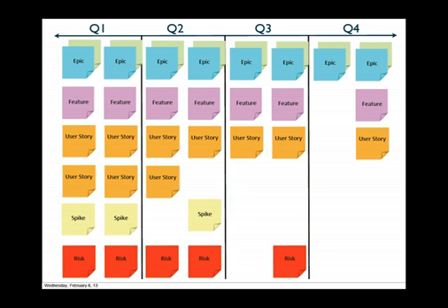So as we're decomposing the features and the user stories and coming up with spikes and reducing risk, we absolutely have to have a collaboration between the architects and the business at the higher levels, because at that point, we're no longer trying to figure out how big it is. We know how big it needs to be to be profitable. So now we're trying to figure out what user stories and what features we can actually put into the backlog to make that epic-level commitment a reality. Okay, it's a really different way of thinking about it.